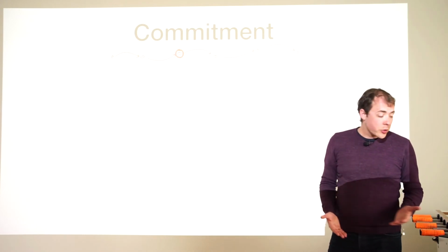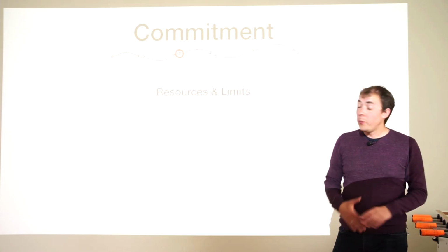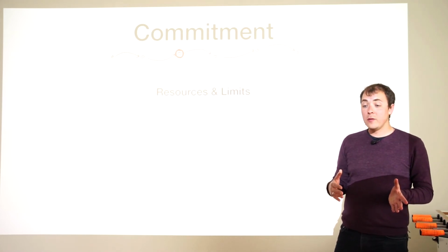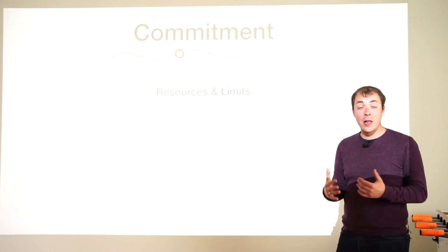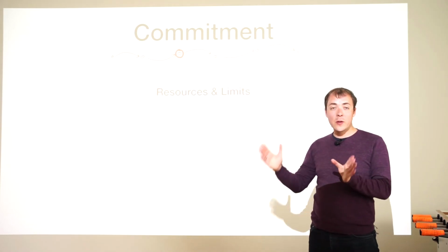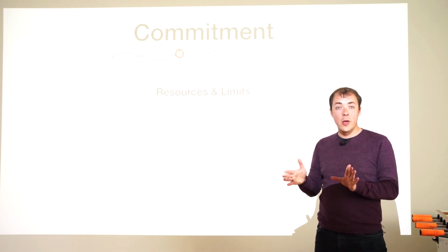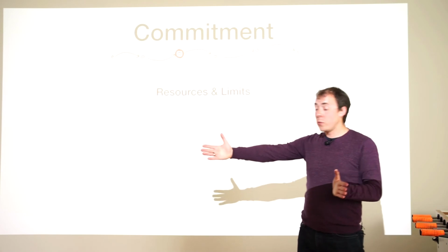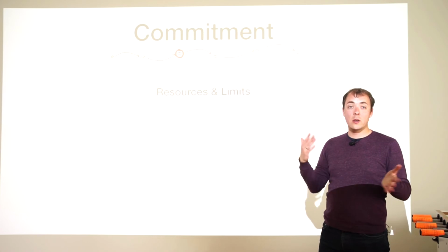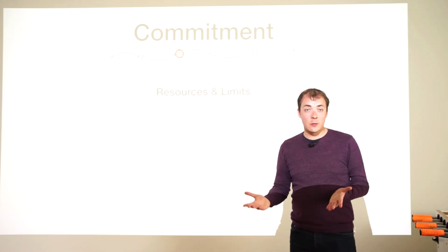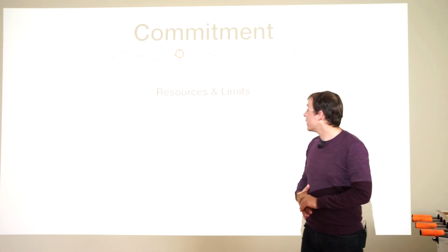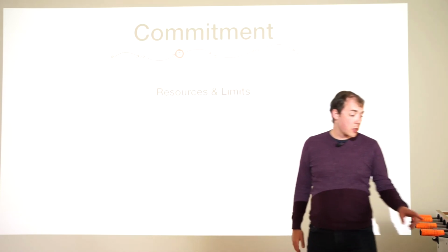So we make it a very conscious decision to commit on building a feature, because this means we need to allocate resources. And only recently we started setting ourselves limits of those resources. Okay, you can work on that feature, but only for 2 months. And if it takes longer, then we need to talk about it. It's not that you failed if you have not finished it within 2 months, but if we get there, maybe the concept wasn't good enough, or we didn't talk about enough of the risks. So something must be wrong inside that feature pitch that didn't work out. So we need to commit on resources. We set ourselves limits.